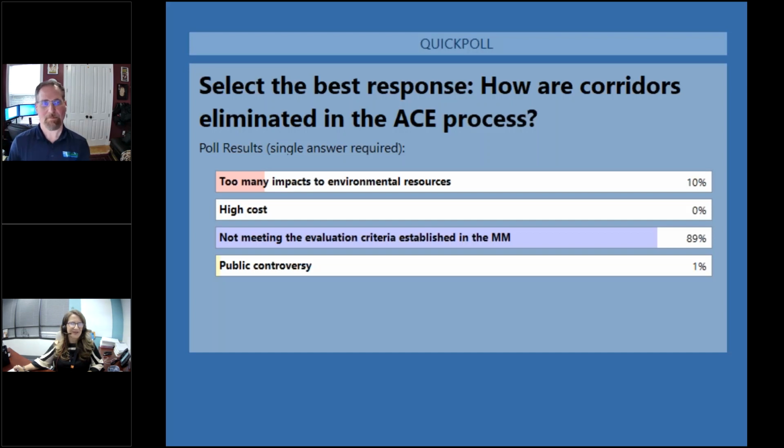Thanks, Kurt, for that question. It's a great question. Every project is a little bit different, and let's say you've done a land suitability analysis, so you know where those fatal flaws are. Then maybe it makes more sense to narrow that corridor width and select a smaller buffer. The buffer is there to provide you flexibility. After you do your analysis, if you come into a resource that you have to avoid, then you can use that buffer distance to avoid it.